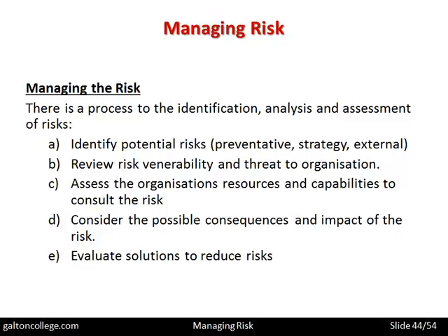Try to evaluate solutions to reduce the risks. Insurance, I mentioned earlier, may be a possibility. It's not available in all situations, but in some situations, perhaps against climatic issues and storms and natural disasters, it might be possible to take out insurance. But the company can't really insure against customers not buying its product, or of new products coming onto the market, or of the general economic environment turning down in the country. These are not insurable risks.